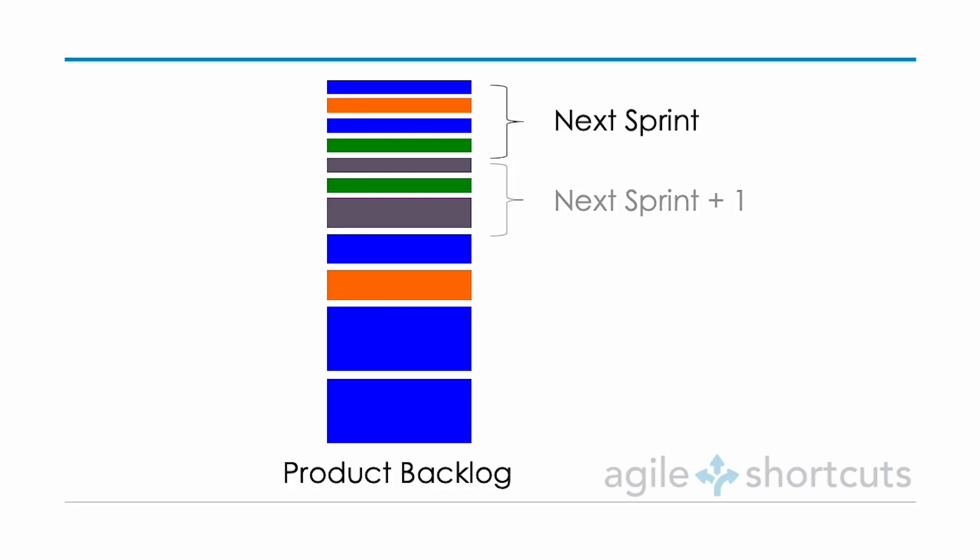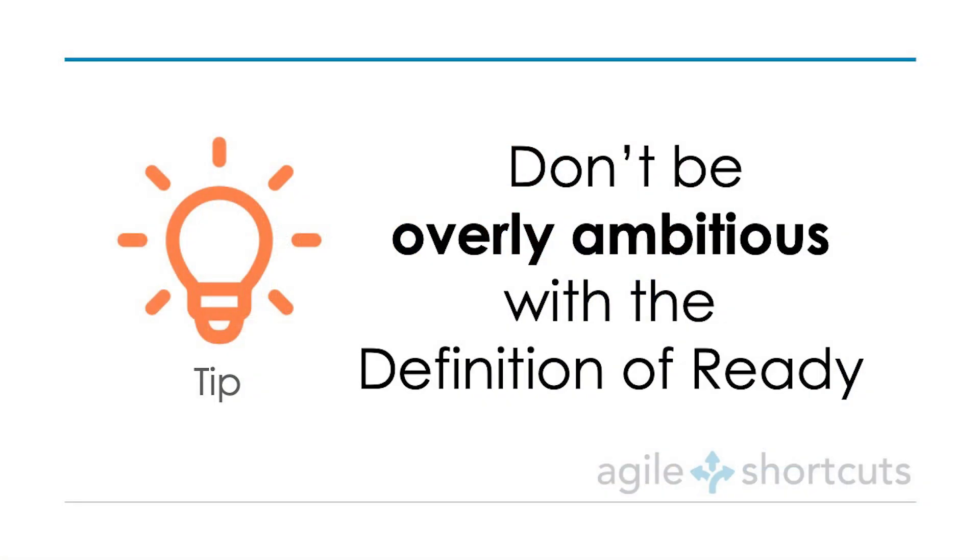A key tip: aim to stay one to two sprints ahead with sprint-ready product backlog items. With a Definition of Ready in place, the goal is for the next one to two sprints' worth of product backlog items to meet the Definition of Ready, ensuring you always have well-defined, well-understood, and appropriately sized items ready for your sprint planning session.